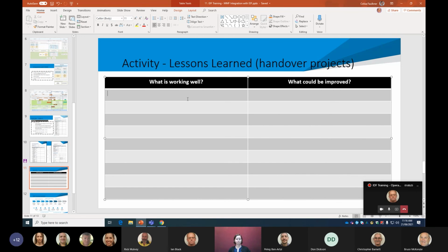I suppose we've learnt some important lessons recently with some of the projects in the water sewer space that have flowed through into what we've put in these checklists. But I think we're starting to engage better and seeing the importance of making sure the training's done. So even as works are being constructed, we're having sessions with the operations teams so that they're familiar with the equipment that's being handed over. And yeah, Righto, ready to go.